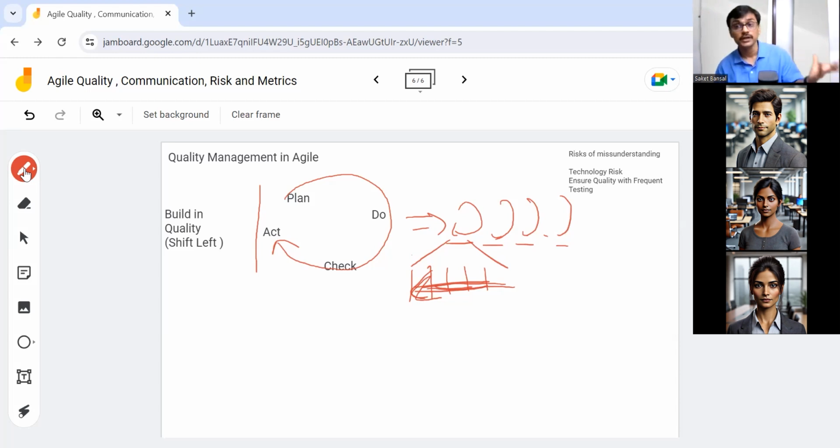And focusing on working software is the primary measurement of progress. So you need to have something showing. It's not that you create a metric saying our requirements are 50% complete. We can say no, 50% complete. Show me the requirements which are clearly complete, and that takes care of good quality in our projects. So that's an agile way of looking at quality.